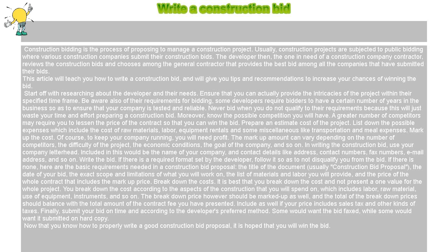Break down the costs. It is best that you break down the cost and not present one value for the whole project. You break down the cost according to the aspects of the construction that you will spend on, which includes labor, raw material, use of equipment, instruments, and so on.